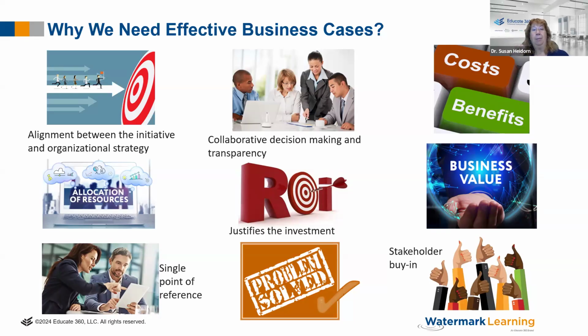because I would take time to build those relationships with people that it mattered to and say, hey, do I have the right data? Are we solving the right problem here? What do you think about these options? Will they fit in your culture? Will they make sense with what else you're doing? Because there's always dependencies. There's times where projects depend on other projects, and one has to be done first before the other. It might impact org change or HR stuff or whatever, right? But I would check it out. So I knew by the time I submitted my business case, it was always approved.